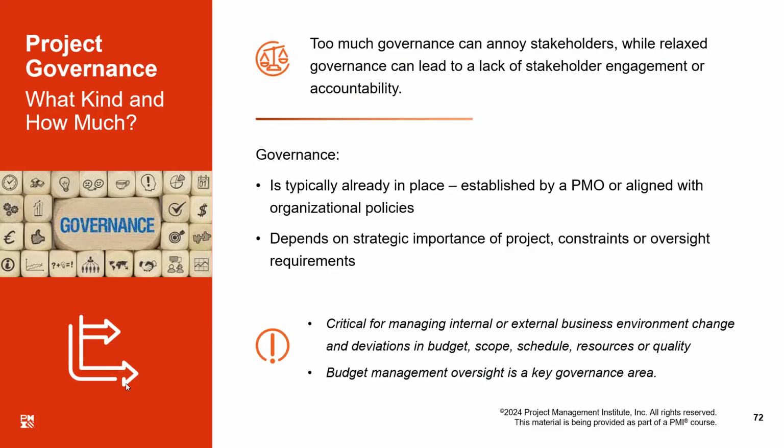Well, as far as projects, programs and portfolios are concerned, if there is a PMO in your organization, we can look to the PMO to guide us on specific governance guidelines. I'm not saying that the PMO should establish all the lower level governances for projects, programs and portfolios. I still think that the higher level boss is the one who should provide the governance. But the question is, is he an expert at creating governance plans? So the PMO can come into play.